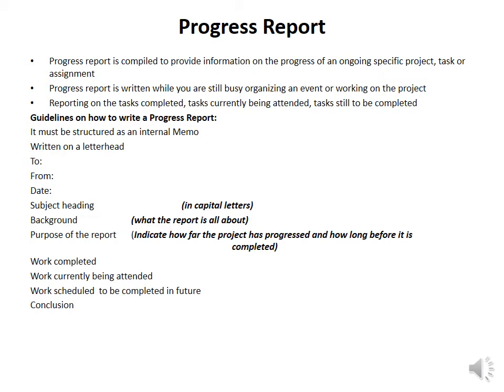You will divide your purpose to state, for example, that you are in stage two or stage three of your renovations in terms of sorting out the roof or doing the painting. Under 'Work Completed', you put what has been done. Under 'Work Currently Being Attended', you state what you are still busy with. Under 'Work Scheduled to be Completed in the Future', you state what needs to be done and any challenges. In the conclusion, you state what challenges you are facing, how far the work has been done, and what assistance you need from your managers.